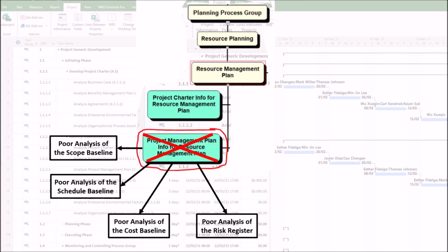The key team member may resign. Risk requires a mitigation plan, such as cross-training or identifying a backup candidate. Without analyzing this risk, the plan lacks countermeasures. Second, single points of failure. The plan may centralize critical knowledge in one person without any knowledge transfer or succession strategy, putting the entire project at risk if that person leaves.